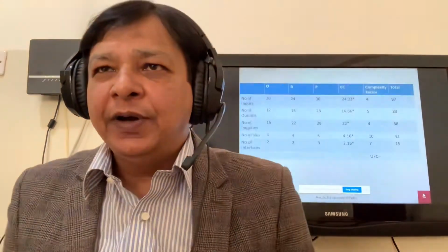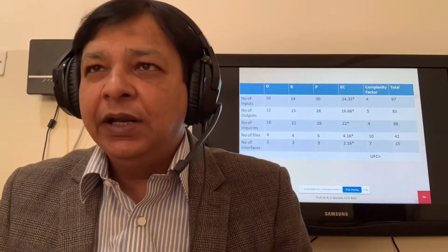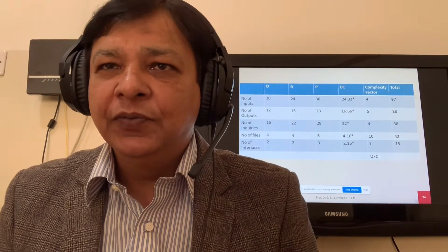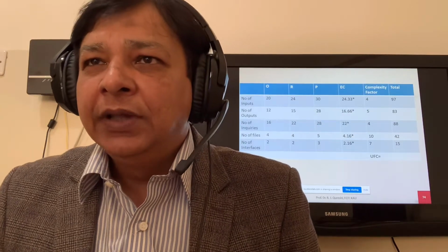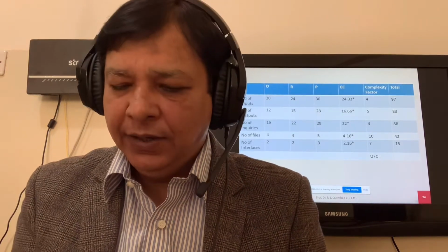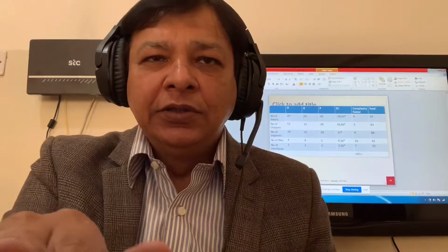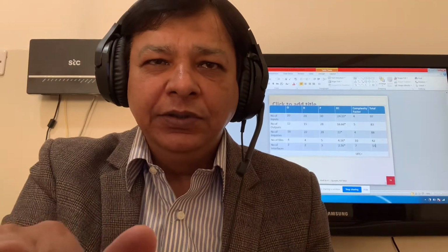The summation of these 5 values in the last column where we have the total is equal to UFC. So 97 plus 83 plus 88 plus 42 plus 15. The summation of the 5 values is equal to UFC, 325. Now we go to the exercise.